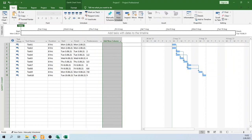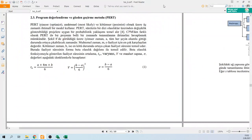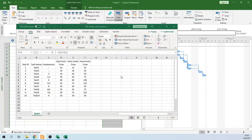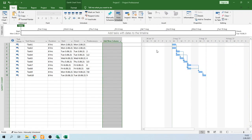As you know, in order to make a PERT analysis we have to have three times: optimistic time, most likely time, and pessimistic time. We also have to calculate expected time and standard deviation. So now let's define these durations.